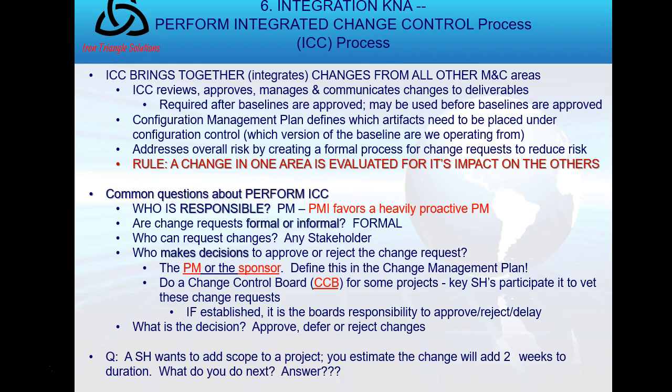A change request can be approved, it can be deferred, it can be rejected. Usually the project sponsor and the project manager are involved in that. The project manager is setting up the change control board. You'll have a change control board, which you will set up in your change management plan in advance of the project, so you'll know who's on it. You'll have the change process defined in advance. You'll have a change control log, and that log is where you'll record the approved, rejected, and deferred changes. You always record, even a rejected change, you file the documentation because it will come up again.